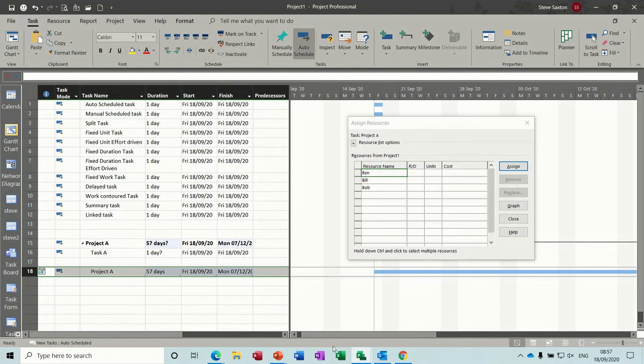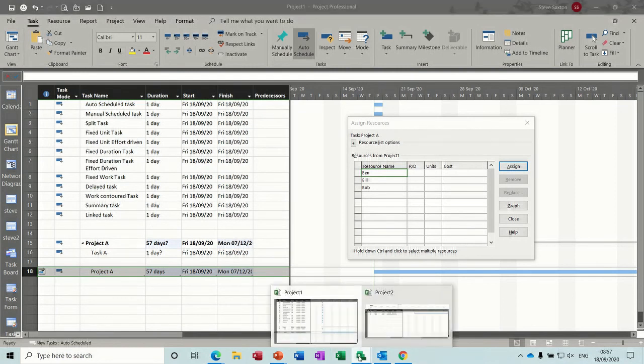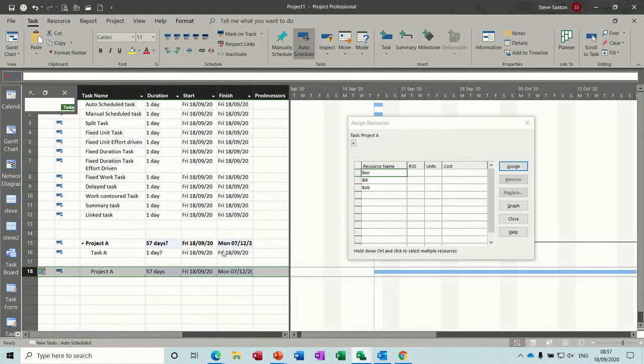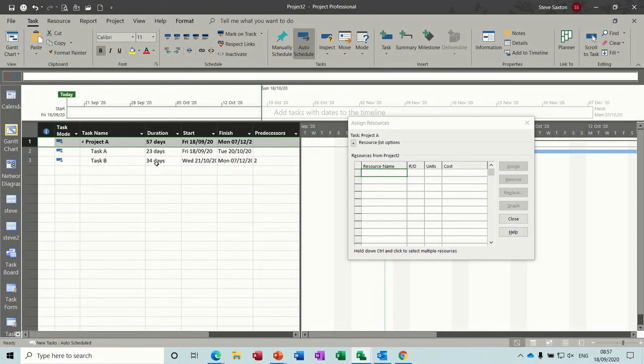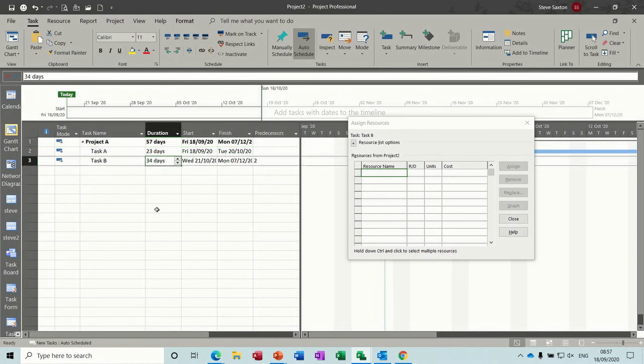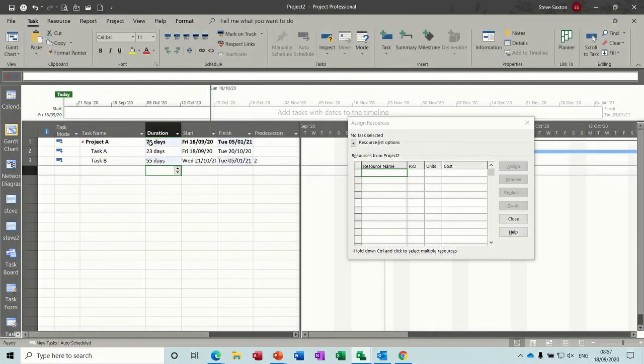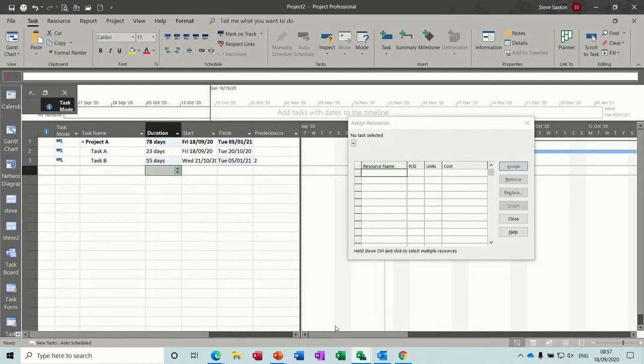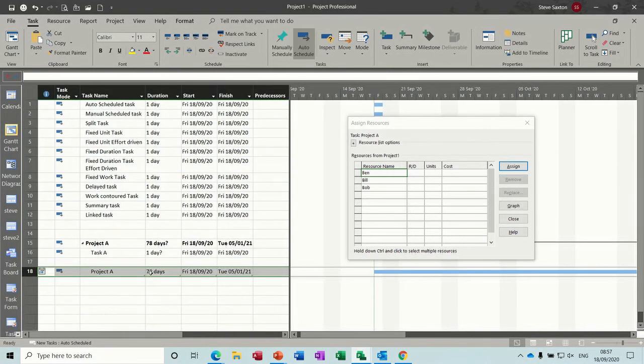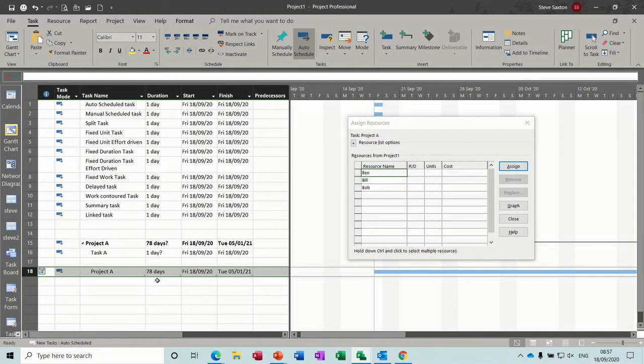Now if I go back to the other project file, and change the duration of one of these, so the total changes at the top there, 78, when I come back to my first file, my source file, that's automatically changed. So this is a great way if you need to pull off summary information from a huge project, or lots of different projects, and you want it in one central place. That is how you can do that. And that is linking tasks.